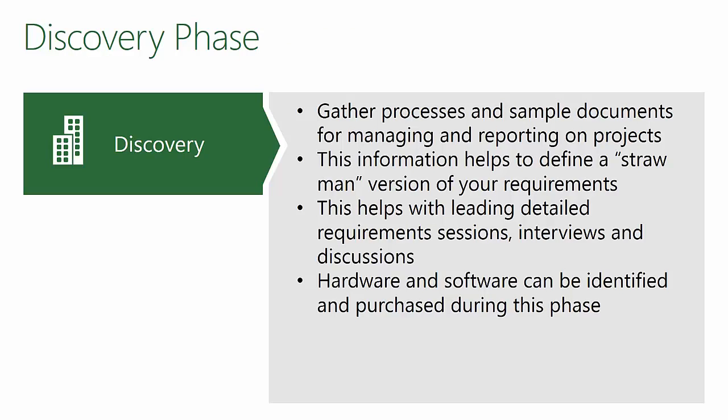In the discovery phase, you want to gather processes and sample documents — typically what you're currently using to manage projects. This gives you a rough idea of what the requirements will be, which then leads you into more detailed sessions so that you can move into the actual configuration of the tool.